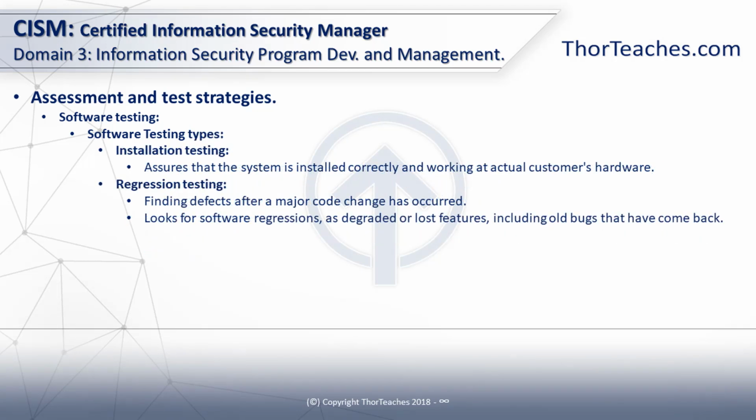Then we do installation testing. Does this software actually work the way it works on our systems on the customer's hardware? I know of large projects where the software was designed and built on a certain set of hardware, but when it was delivered to our company, it didn't work because we didn't have the same hardware. The company we had hired assumed it would probably just work, but it did not. So instead of launching that project on time, we had to spend months and months fixing all the flaws that were there because it wasn't compatible with our hardware.